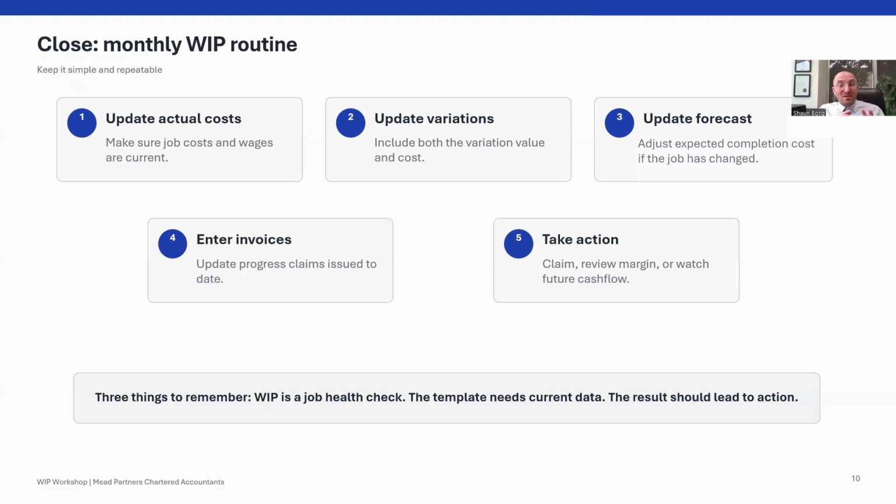Builders WIP is not that. The ATO's view is that long-term contracts can generally be returned using either a basic approach, where we're bringing progress or final invoices to account and deducting all the costs incurred,